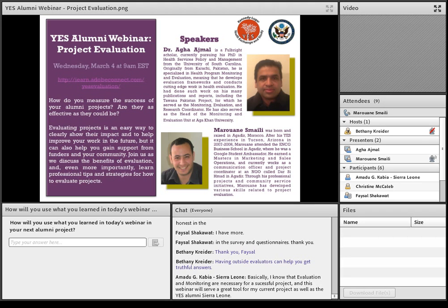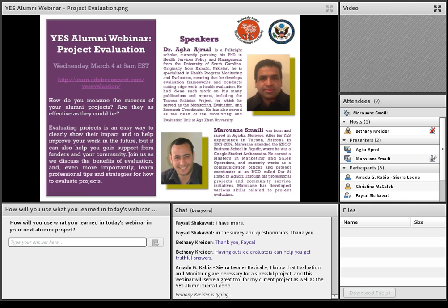Of course, in the first phase of the evaluation, when you're making the questionnaires and the interview guides, you can do it as insiders, the steering committee, probably with the help of professionals or people with more experience in evaluation. But for data collection, analysis and interpretation, it's always good to give them to a third party or a person in the steering committee who was not very involved in the project. So it really depends on the project's nature.